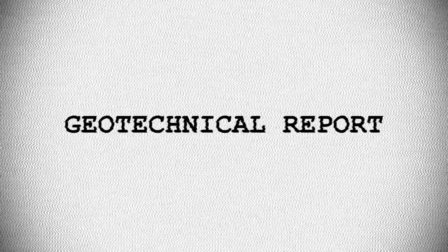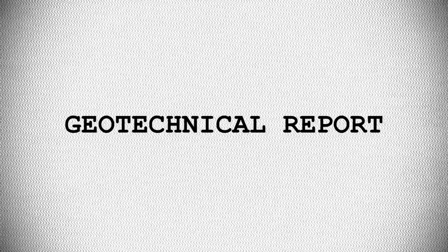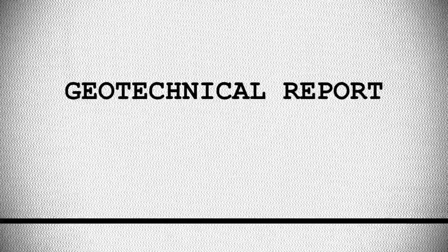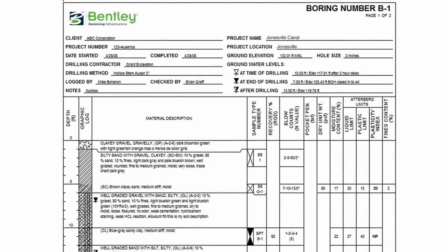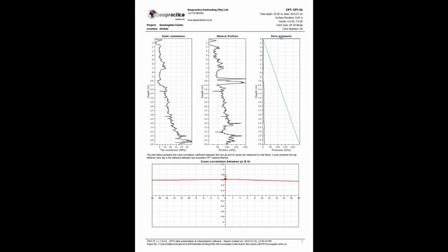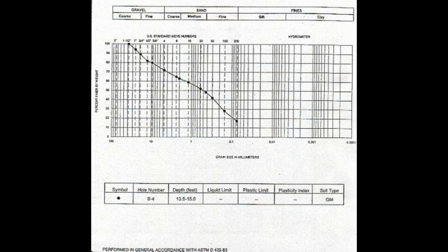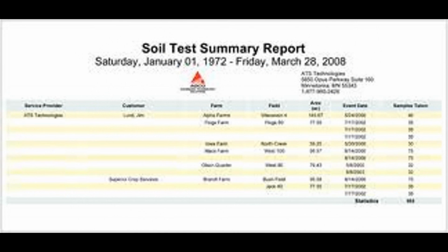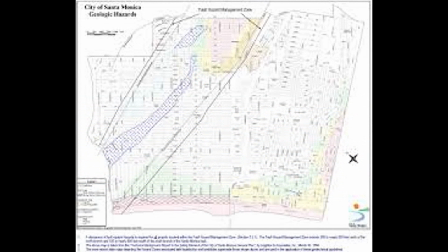Geotechnical report. The report should be clear, concise, and accurate. Both an adequate site investigation and a comprehensive geotechnical report are necessary to construct a safe, cost-effective project. Engineers need these reports to conduct an adequate review of geotechnical-related features, for example, earthwork and foundations. The state-of-the-art consultant should prepare preliminary geotechnical reports for submittal to the design team whenever this information will benefit the design progress. Early submittal of the geotechnical information and recommendations or engineering evaluation of preliminary data may be necessary to establish basic design concepts or design criteria.